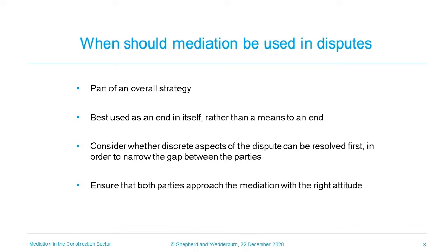It is a good way to end a dispute, but if parties are clearly a while away from being able to settle, it might not be the best option. When a dispute crystallises, each party will consider its position, then entrench themselves in that position. This is not conducive to good mediation. Instead, we would recommend that parties start some other proceedings first to flush out the key issues and allow the parties to see to the crux of the dispute.